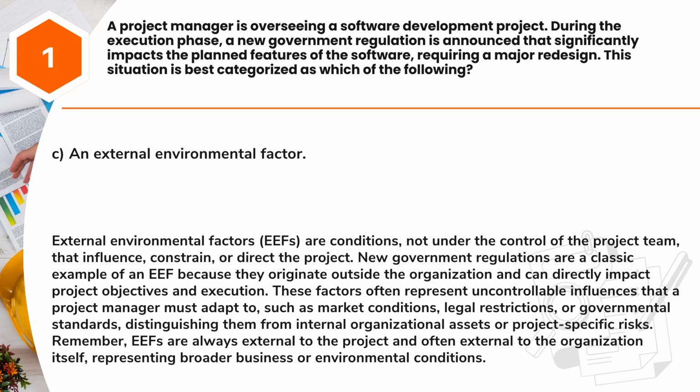Answer: C. An external environmental factor. External environmental factors, EEFs, are conditions, not under the control of the project team, that influence, constrain, or direct the project. New government regulations are a classic example of an EEF because they originate outside the organization and can directly impact project objectives and execution.